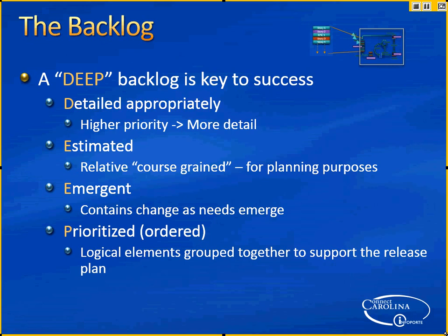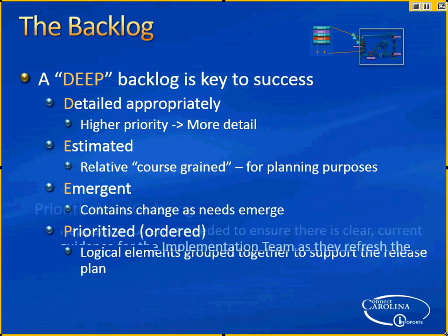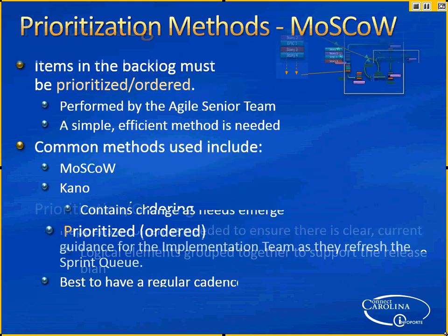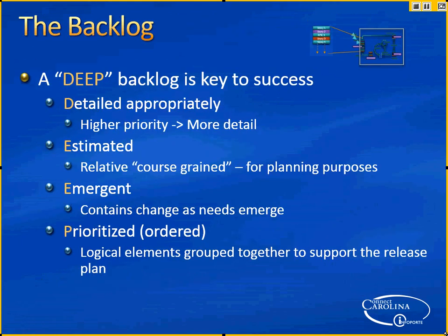The backlog should be, they say, deep, meaning detailed appropriately. Things that have a higher priority, and I'll modify the term priority in a minute, should have more detail. In this case, higher priority means it's probably going to be worked on sooner rather than later.